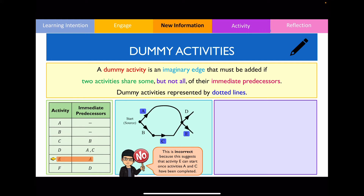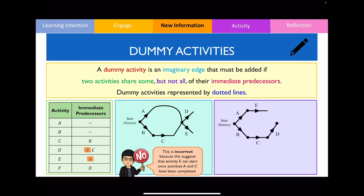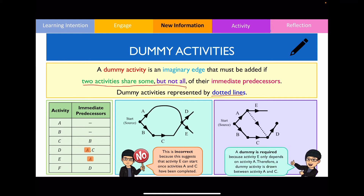Because the network incorrectly shows activity E depending on both A and C, we need to draw a dummy activity. This is an example where two activities share some but not all of their immediate predecessors. On the right I've redrawn the network using straight edges. I'll now illustrate the dummy activity using dotted lines. Notice that the dummy activity does not need a label. By drawing it this way, activity E now correctly has only predecessor A — it does not depend on C whatsoever.